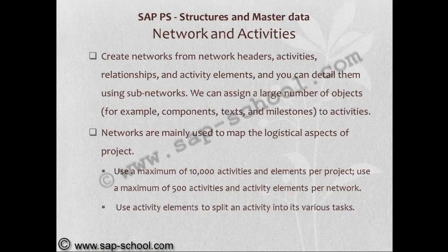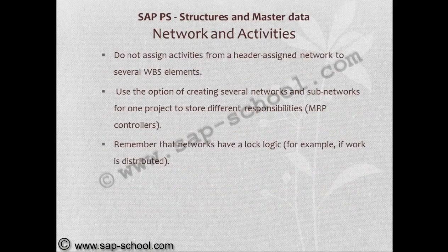Use activity elements to split an activity into its various tasks. Do not assign activities from a header assigned network to several WBS elements. Use the option of creating several networks and subnetworks for one project to store different responsibilities. Remember that networks have a lock logic. So if you follow these tips, the utilization of networks will perform in a better way.